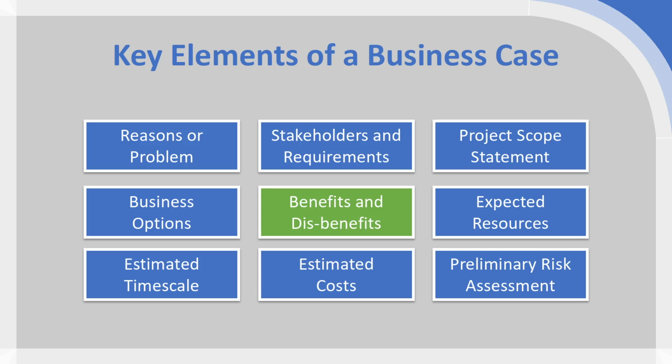And here we have usually a bit of confusion around the language. So benefits and disbenefits are very particular things. They are not objectives, they're not risks. They have to be expressed in a particular manner. So benefits are not objectives. So the benefit of our room painting project or renovating project is not that there will be new flooring in room A305. It's not that the walls will now be a pleasant shade of blue. The benefit is a more positive teaching environment.